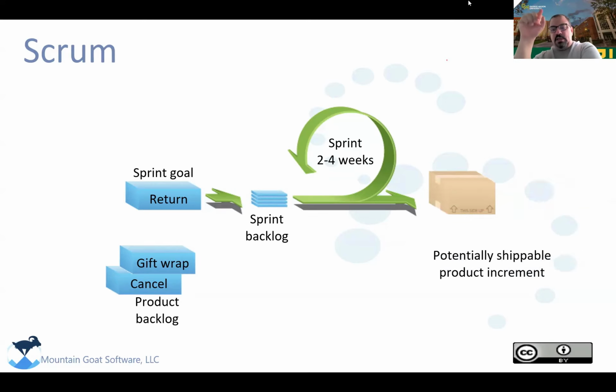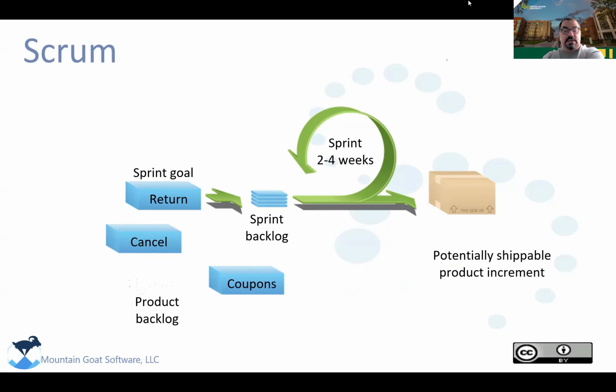After the sprint, you produce a potentially shippable product increment. It's not one paper or one document anymore. It's a done solution. What's a done solution? You solve the goal, and this goal is something concrete in the software, in the system. And these concrete things are documented, tested, and acceptable. Using Scrum, it's very easy to insert new items and iterations.